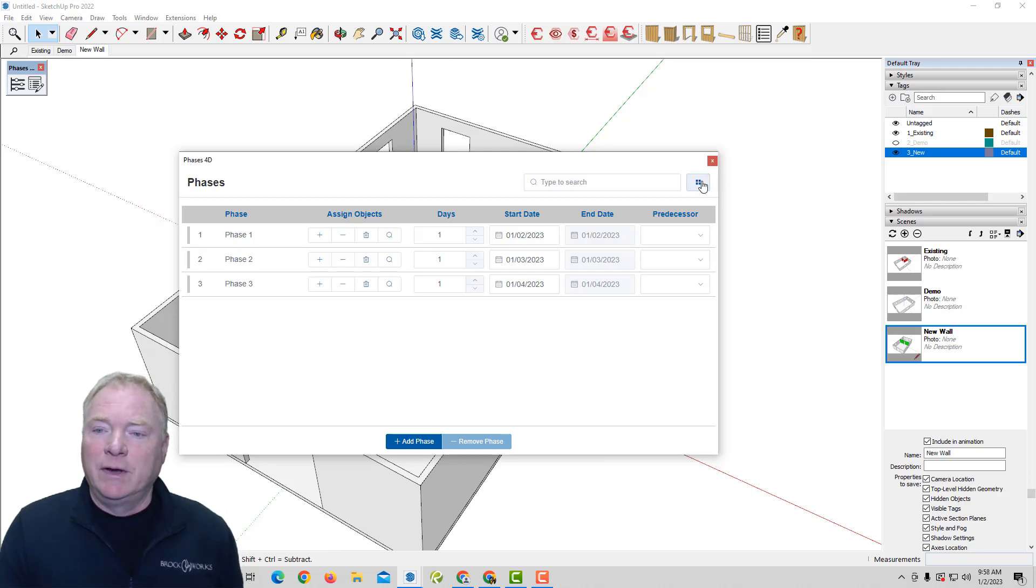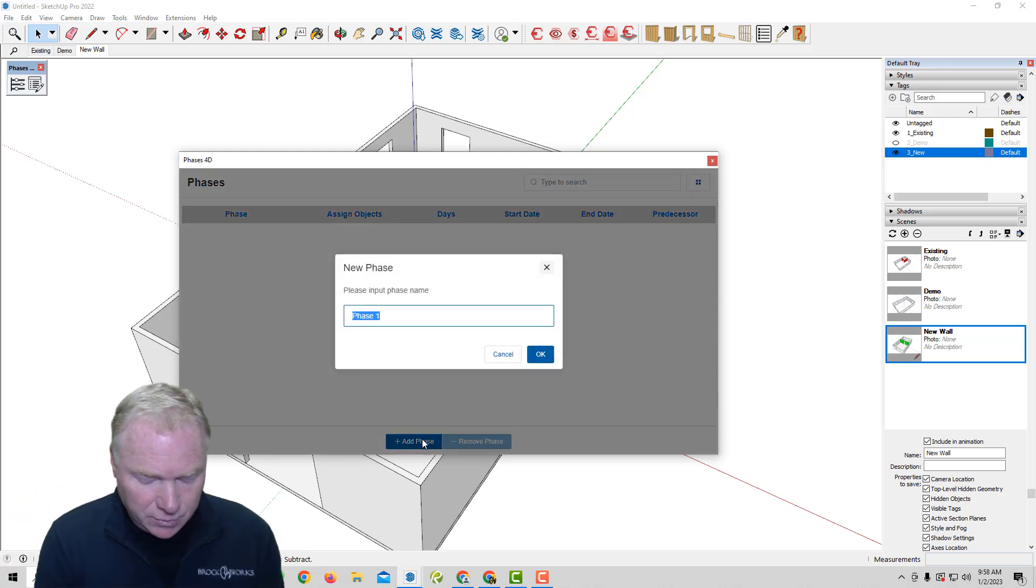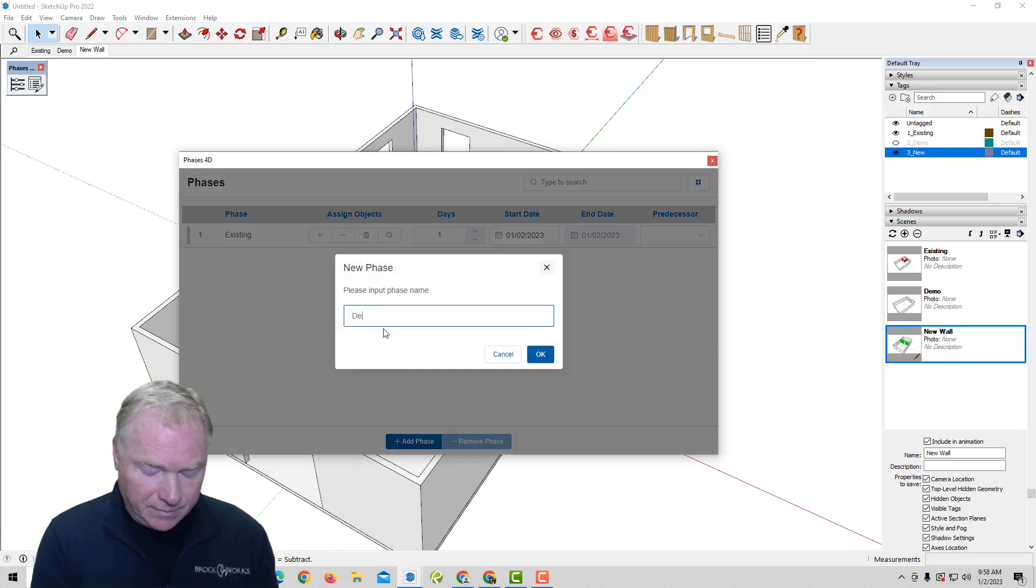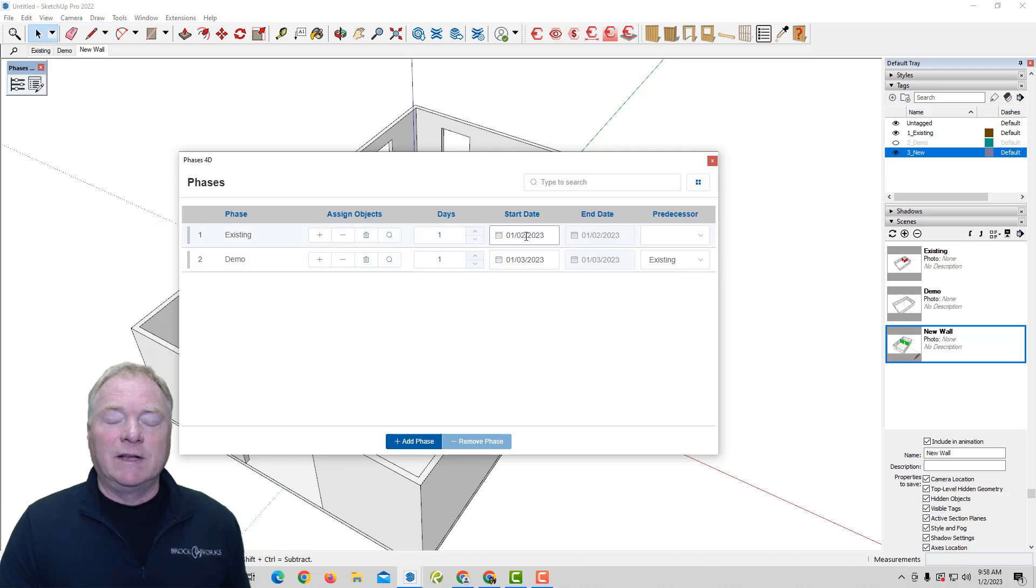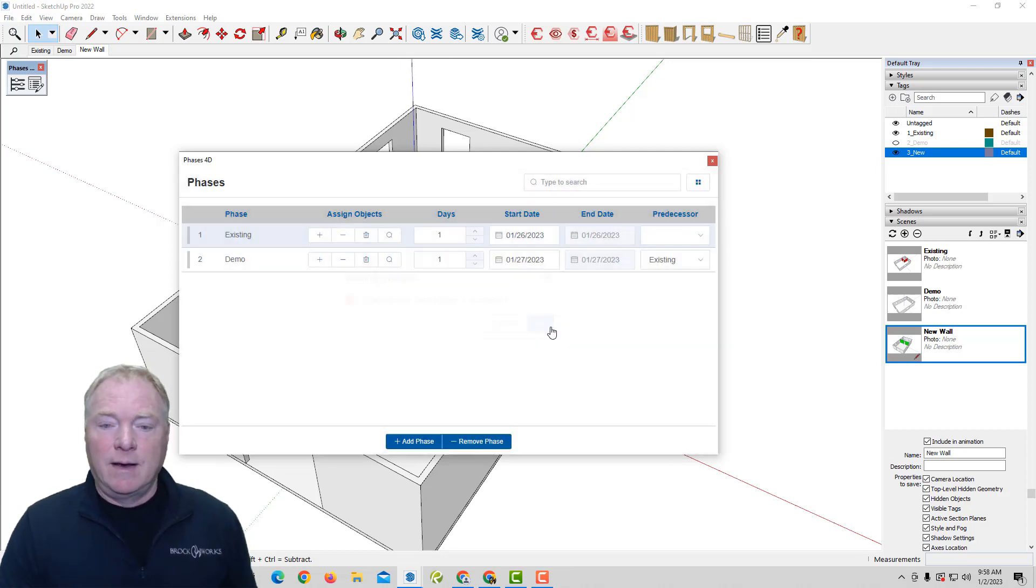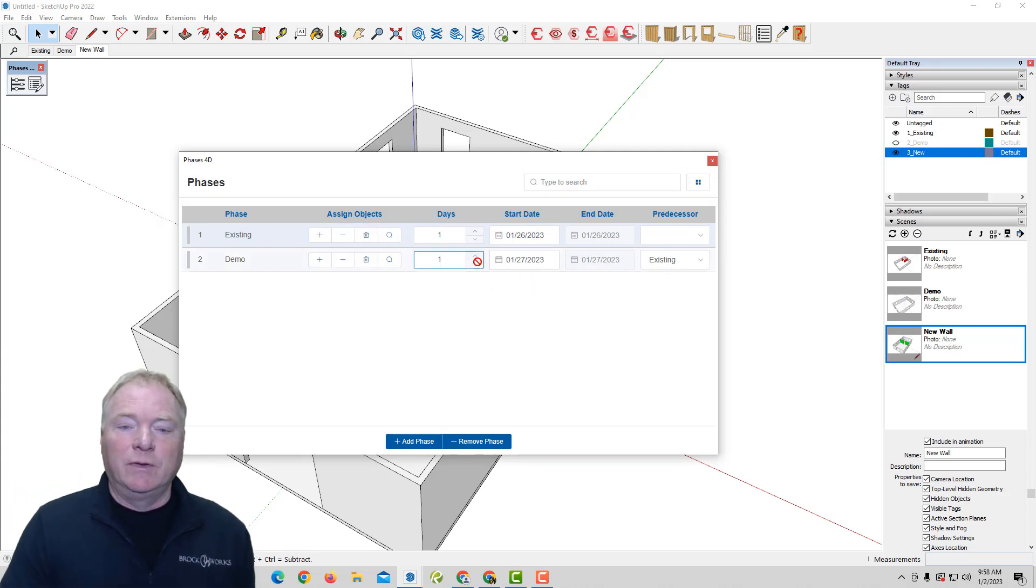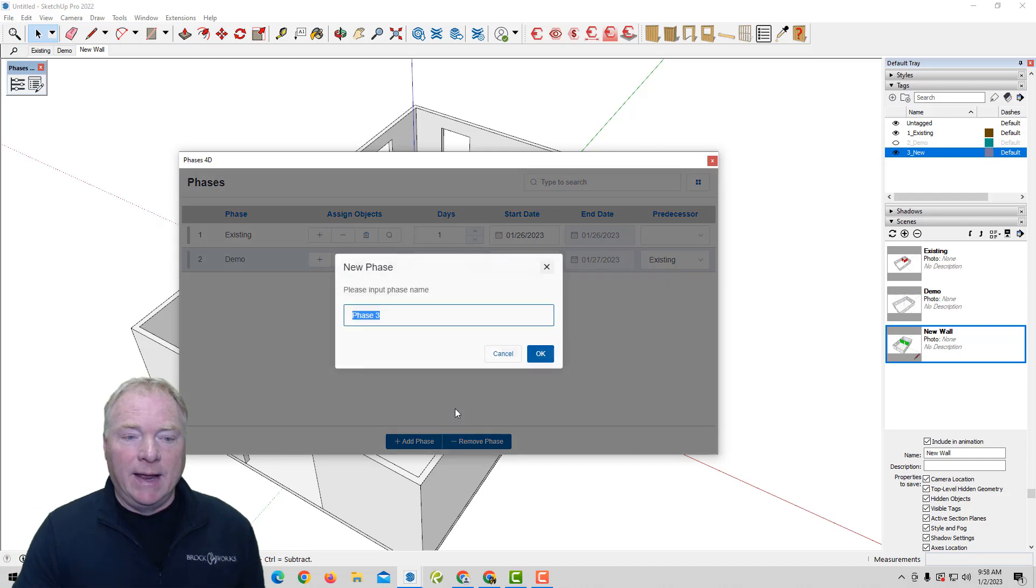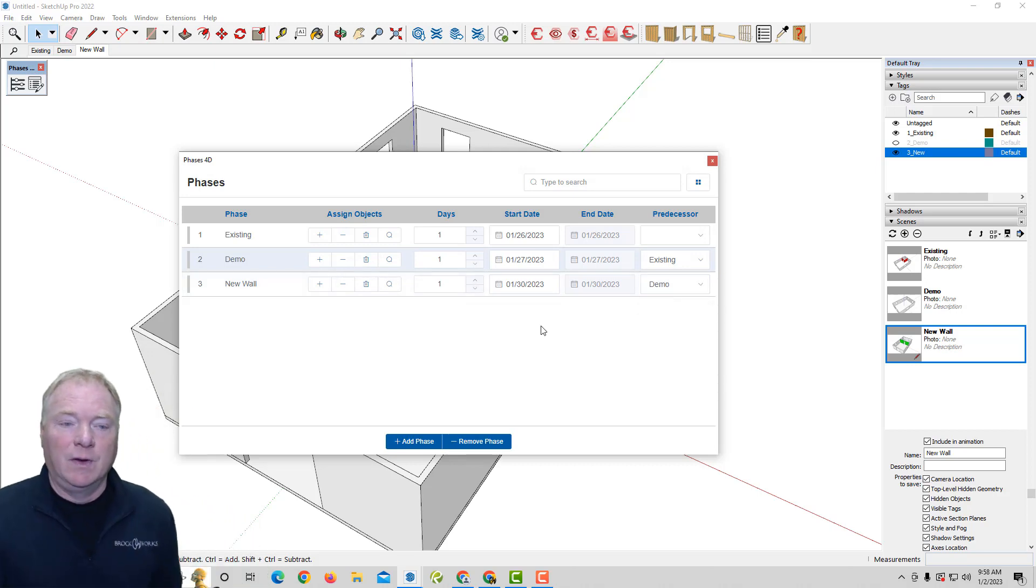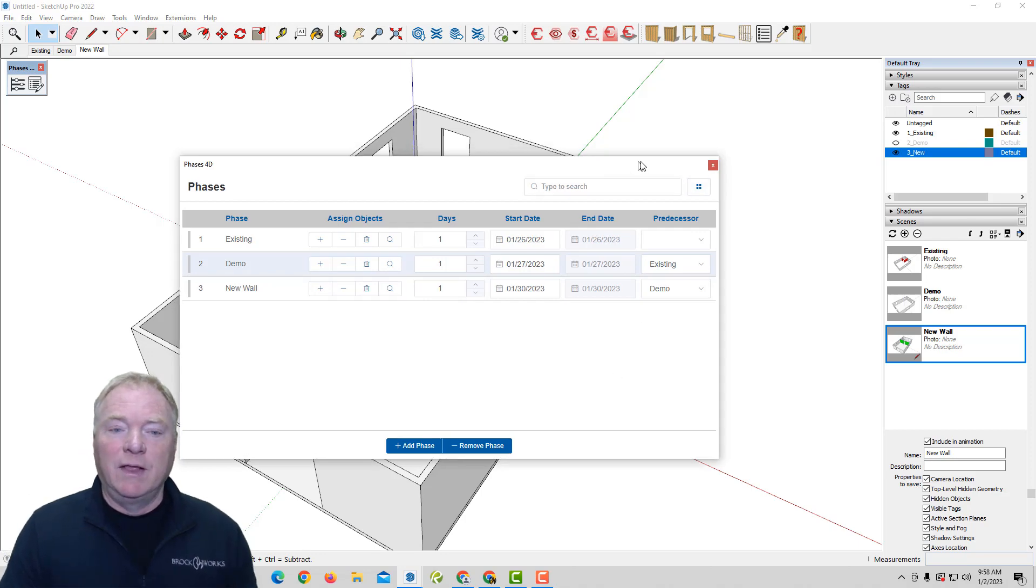So I'm going to go into the settings. I'm going to remove all those. Click okay. So I'm going to come in and say that let's do existing is the phase one. And then I'm going to add a phase that is demo. But I'm going to make the predecessor of the demo phase to be existing. So one can't happen before the other. So watch if I change the start date to, say, the 26th. Now you'll see that's on the 27th for demo. And I could put the duration of days. I can click through here the number of days I want. Simple one like that. Just a one-day job. And then I'm going to add a new phase called new wall. And I'm going to have the predecessor for new wall be after demo. And I'm going to give that a one-day duration as well.